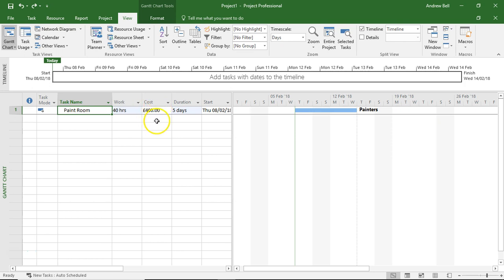Now, what we actually want to model is the fact that there are 20 hours of work, but it's going to take us five days to finish it.